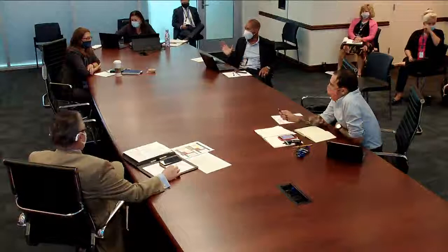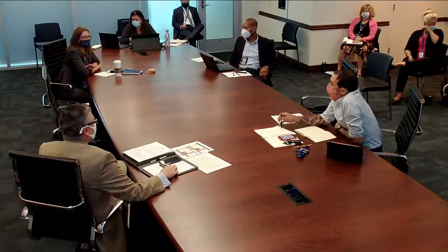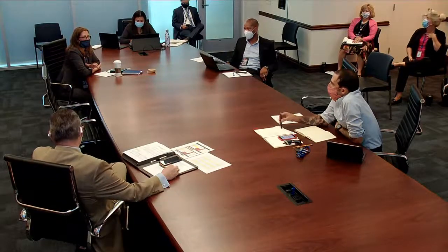That's part of the pitch: if we push for the planning and design of the garage, you can decide that's 2 more years down the road. You have that in place, and then you can decide whether and when you need to trigger construction of a garage. The construction window is 2 years, so you've reduced the window because you've done all the other legwork. But we're just hedging our bets on what parking will be in the future.